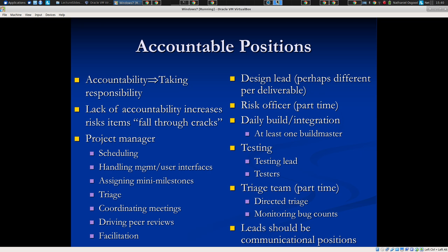Yeah, unfamiliarity, like people being unfamiliar with whatever language or framework that you have. Yeah, so a lot of the team is unfamiliar and therefore unable to make good progress in contributing to growth. It can be a serious issue, particularly if one person has a pet language they want everyone to learn, and people just don't have time and they're struggling with it, and only one person is expert enough to shape it well. Yeah. I don't know if all of that... personality clashes.